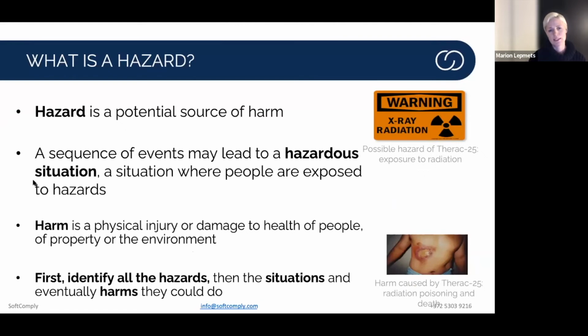And hazard analysis as such is a top-down risk management method, but if you have software as a medical device of a higher risk class, then you should also do FMEA, and it's recommended by 14971 as well. And this is a kind of bottom-up look into risks. Hazard identification is a way to figure out what can reasonably go wrong with your device and what hazardous situations and harm can result from it.